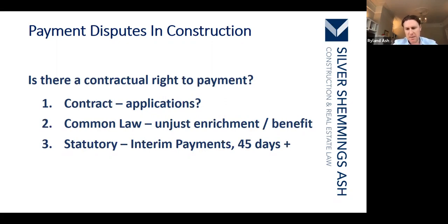That effectively means as much as you can prove. So if you are looking to make a claim on the basis of the common law, you have to make sure that your records are very good and that you can prove each and every amount that you are claiming.